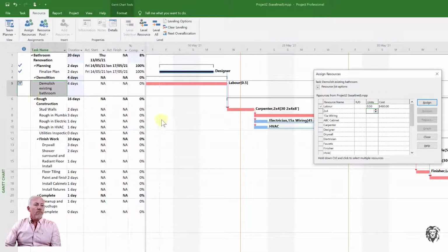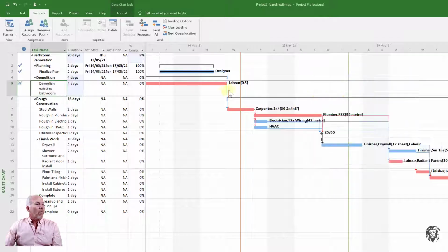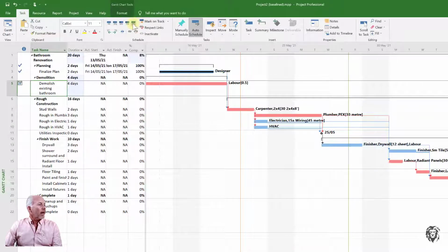So by default it shows what we wanted to accomplish, and so we're going to accept that. Even though we got started a day sooner, it actually took us a day longer. With that done, that's reflective of what we saw on that particular task, so we're going to mark it complete. I'm going to do that by going back and just pressing the 100% complete for our task.